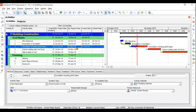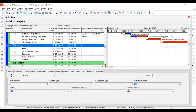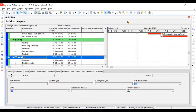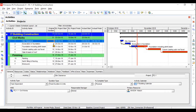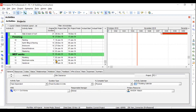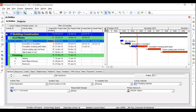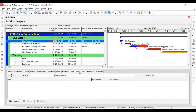After creating the new project, we will create the WBS — Work Breakdown Structure — which includes civil works, finishing, and MEP works. These are the packages under which your activities will come. Then we will add activities under the respective WBS: site clearance, excavation, foundation, column and slab under civil works; painting, earth filling, brickwork, doors, windows, and plastering under finishing; and plumbing, electrical, and handover for MEP. Then we will understand some settings in the detail view related to activities, such as relationships, resources, codes, and WPS.